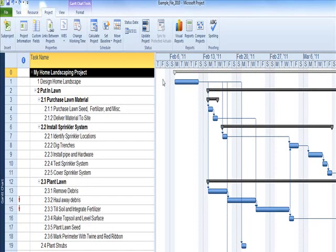If it starts later than was planned, it is behind schedule. The project has a Gantt chart that's designed to compare baseline dates and to visually show these differences. It's called the Tracking Gantt.